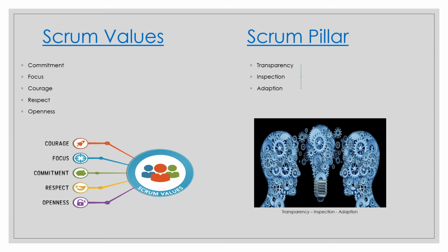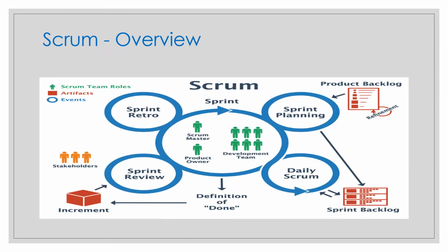The fundamental unit of Scrum is a small team of people, right? The Scrum team consists of one Scrum Master, one product owner and developers. Within a Scrum team, there are no sub teams or hierarchies. Okay. So it is a cohesive unit of professionals focused on one objective at a time, right?